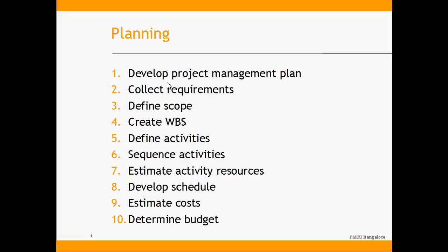Within planning, we collect detailed requirements. So far we were operating through the statement of work, which is the highest level of requirements. During planning, we elaborate those into detailed requirements, then define the scope. Typically, the requirements document version 1.0 becomes the scope, and once the scope is defined, any changes to it must undergo a change management procedure.